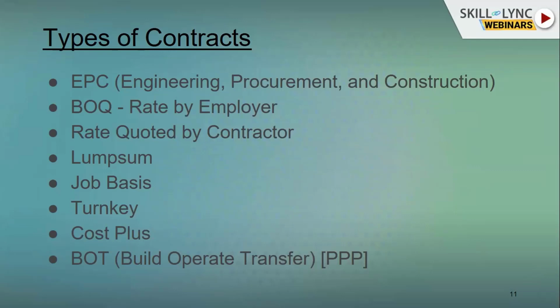I will just give you the number of seats required for my employees, the MD's cabin, the number of cabins required, the number of toilets required, and everything can be done by a contractor. Starting with the engineering aspect, procurement and construction, that contract will be nothing but an EPC. The owner will say only that I need this particular office under this requirement, within this budget and within this timeline. Every engineering aspect can be designed by the contractor here.